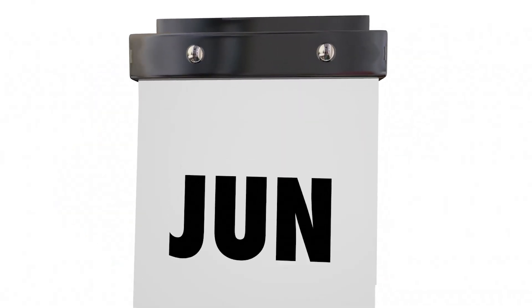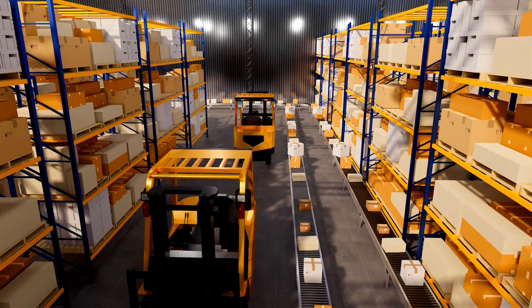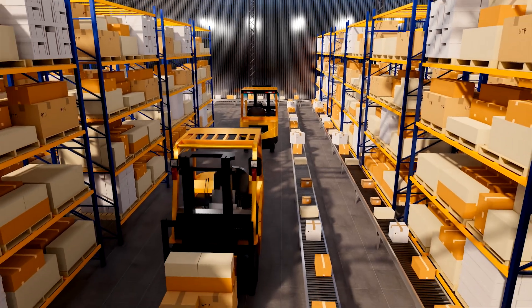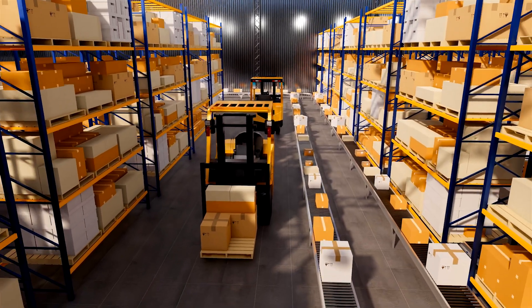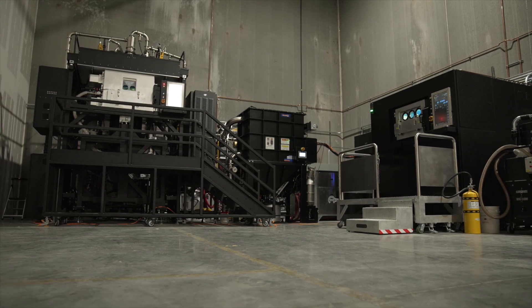Lead times for impellers like this can be anywhere from 6 to 18 months. Mitigating this risk means going back to our large stock of inventory.